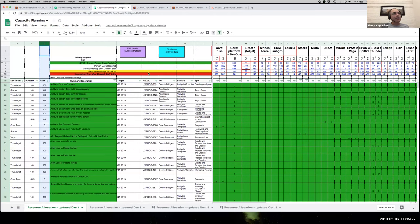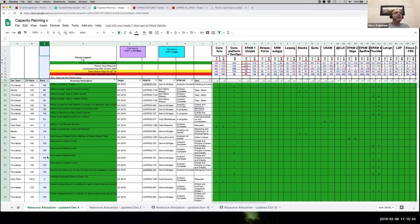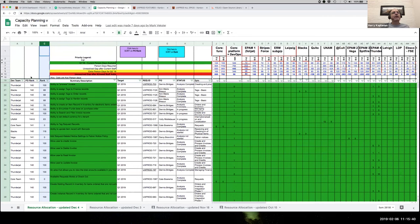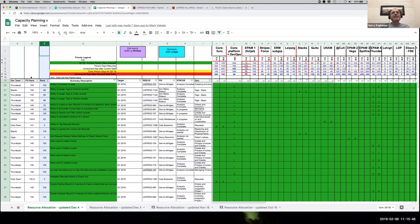And here we see the ranking value that's created based on the priorities you saw. But then we've got another ranking we apply here and these are the product owners. And the product owners work very closely with not just the librarians, but the developers as well. And it's their role to really flesh out the details of those features into stories so the developers know exactly what needs to be built.